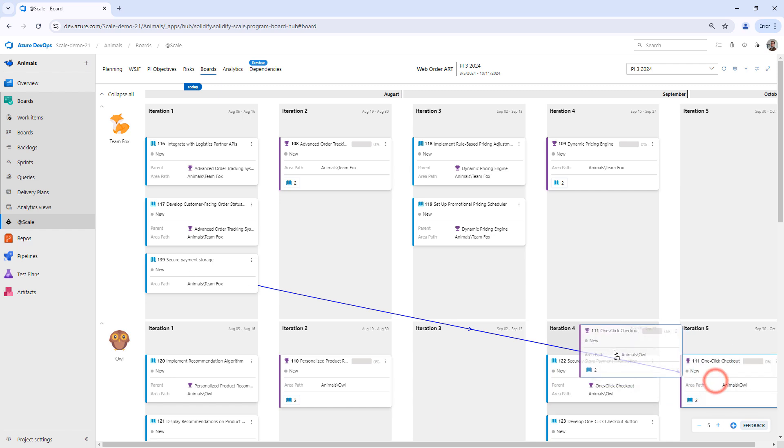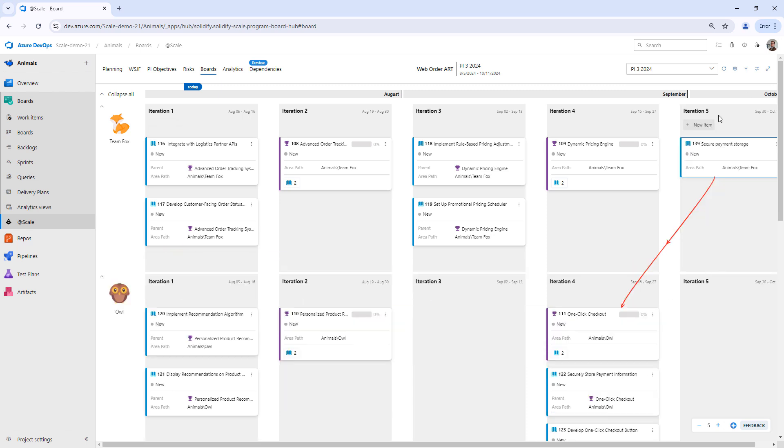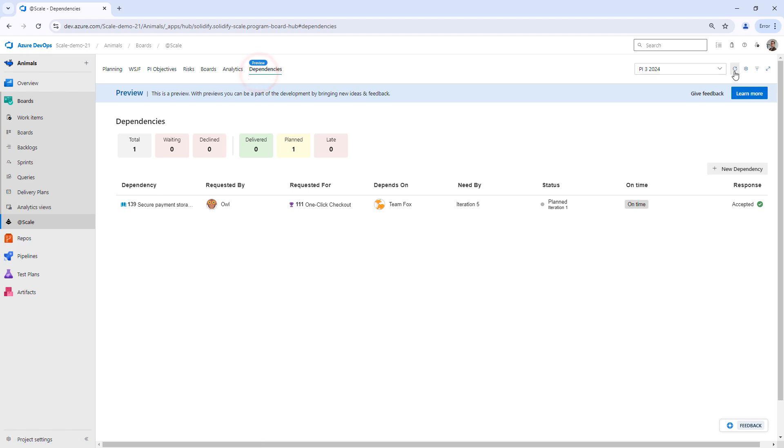For instance, this user story might come at a later point in time. Let's say that the feature is planned for iteration 4 instead and the secure payment storage is going to be delivered later. This is going to show a signal here immediately on the dependency hub that it's late.